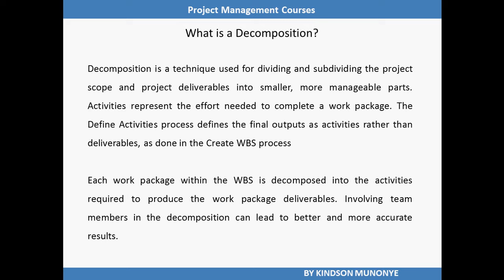We are saying that decomposition divides or subdivides project scope and deliverables into smaller, more manageable parts. Activities represent the effort needed to complete a work package. The defined activities process defines the final outputs as activities rather than deliverables as done in the create WBS process.